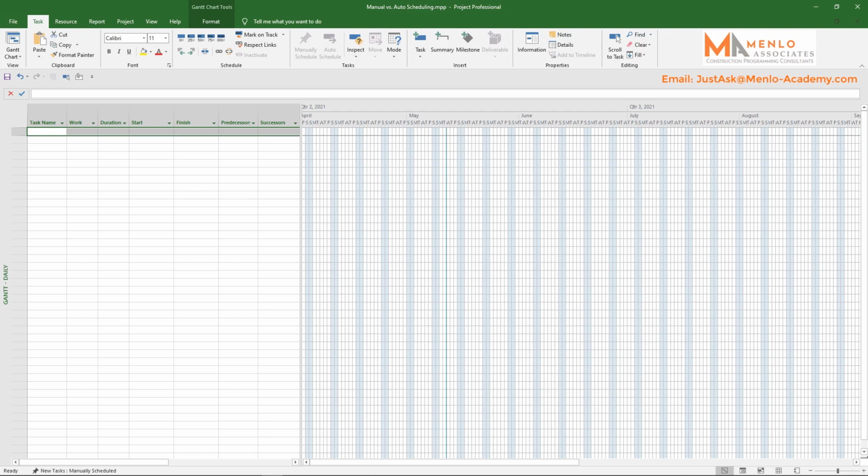Microsoft Project allows us to schedule tasks in two ways, either manually or automatically. Manual scheduling places the requirement to define the start and end dates of tasks with the project manager themselves. The dates entered in for tasks will become mandatory. In other words, they tend to stick regardless of any existing relationships to other tasks. This can be an advantage, but it requires careful thought and extra manual work to update if things change in the future. The more tasks you schedule manually, the more risk you face having additional work down the line than is likely necessary.